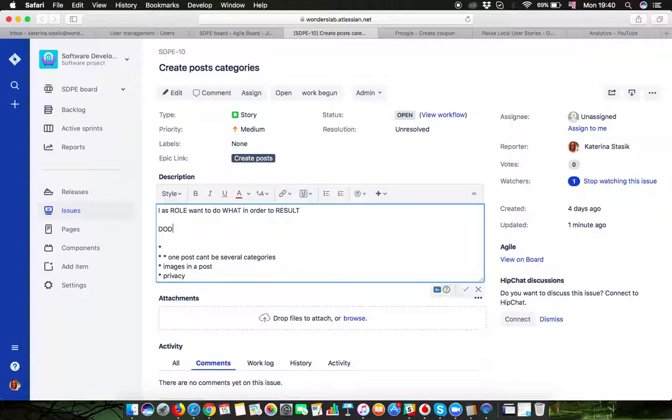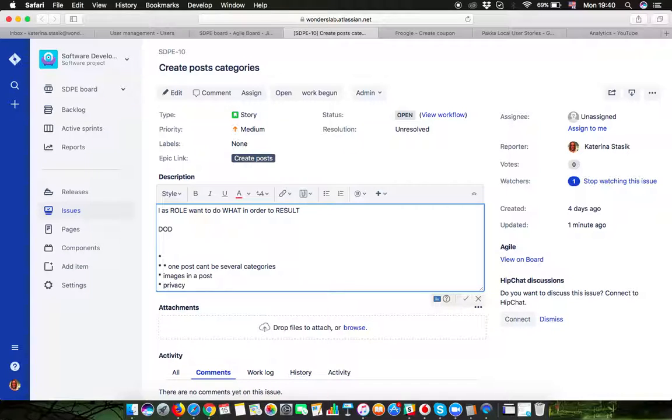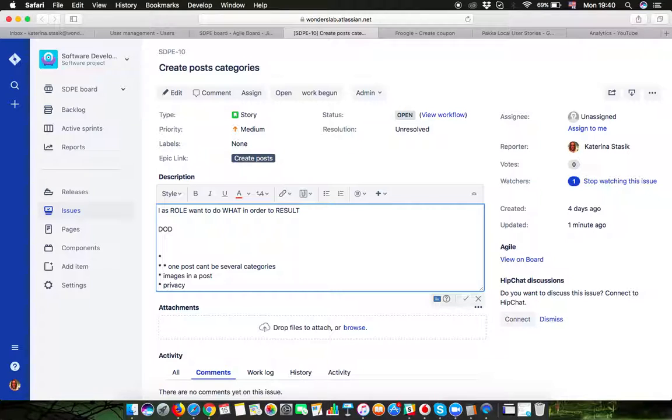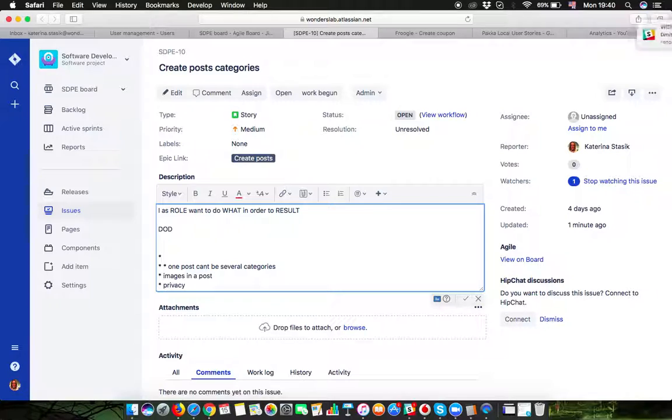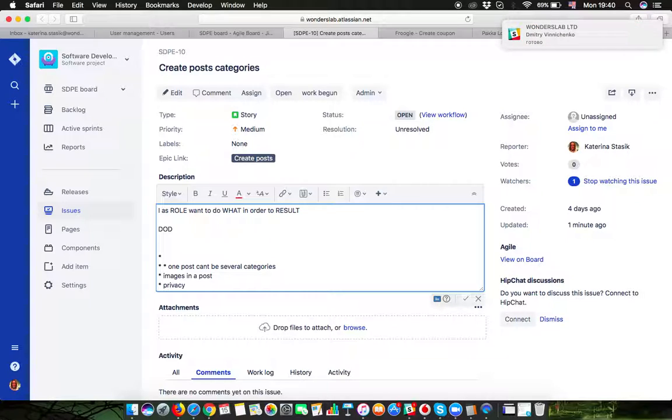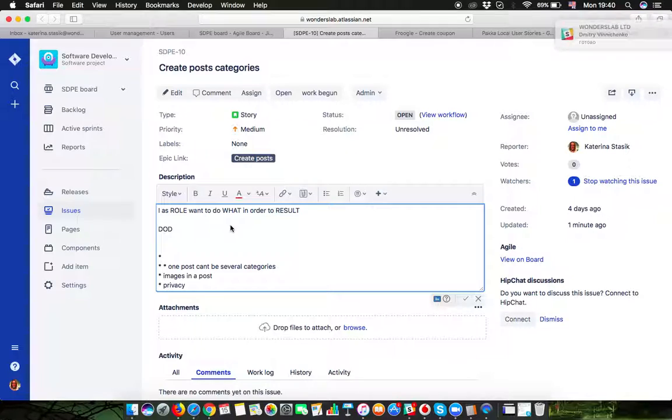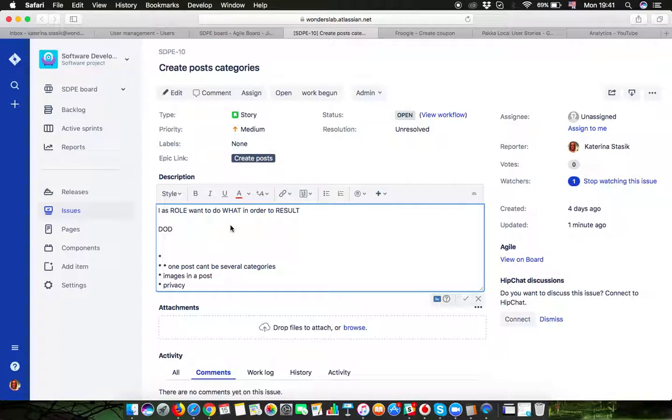This is basically the formula for properly writing a user story. And under the user story, you give people the definition of done, the specific criteria which when accomplished and when met will mean that the story is actually complete. If those criteria will not be met, then the story is not complete.